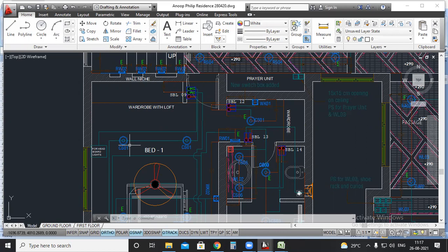So this client was actually asking for the material quantity. Now for the bill of quantity, he is asking for the material quantity. The material quantity will specify the equipment numbers and details. Now, there is no need to mention the supply, installation, commissioning details.